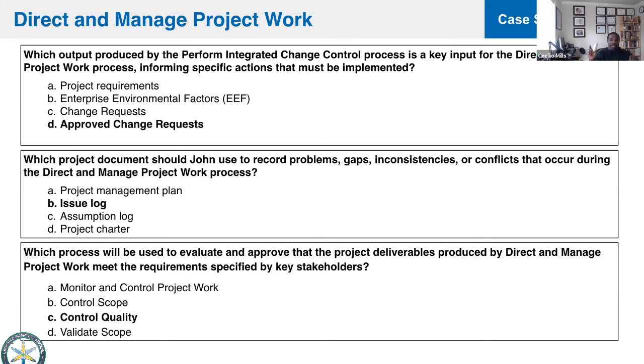If they ever talk about the deliverable, we're going to say the change log, and then it gets approved or denied. And if it's approved, then that approved change request becomes an input, right? That's an output from that process and becomes an input to this. But if we're just talking about the work and the people, then that's an issue. So this is between people.